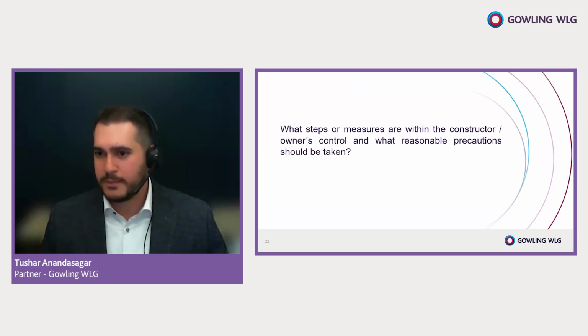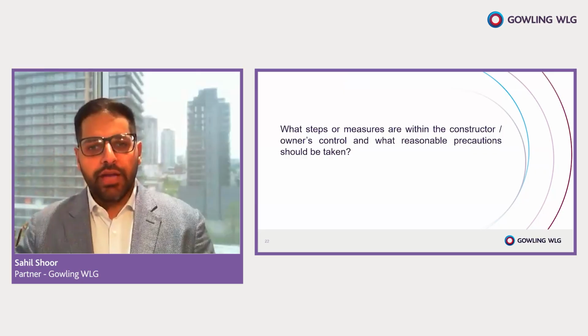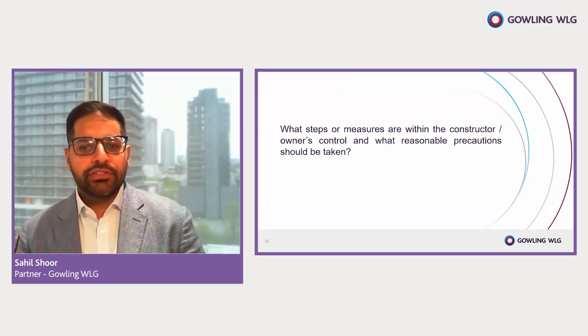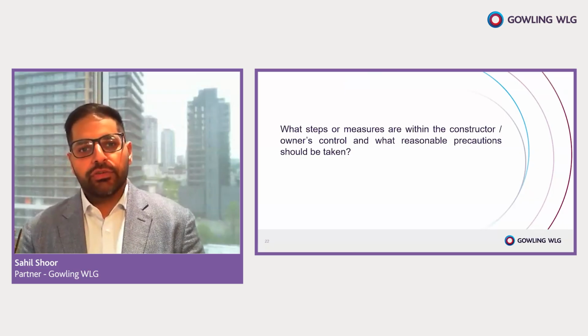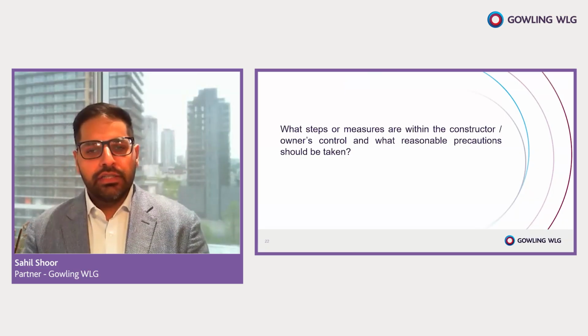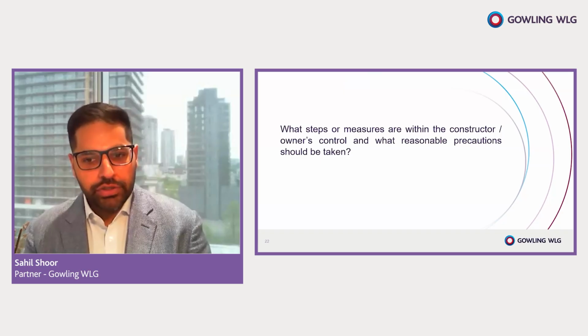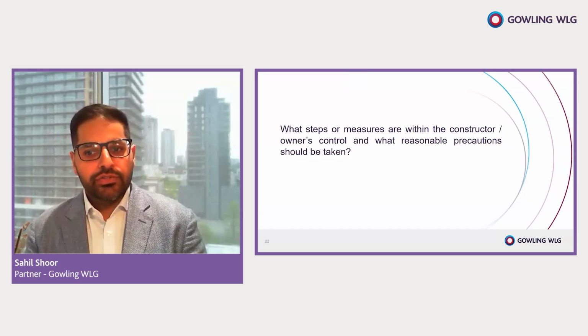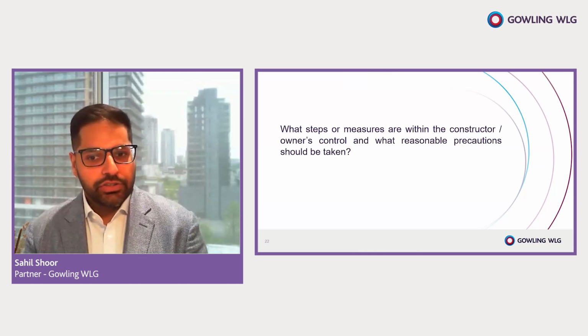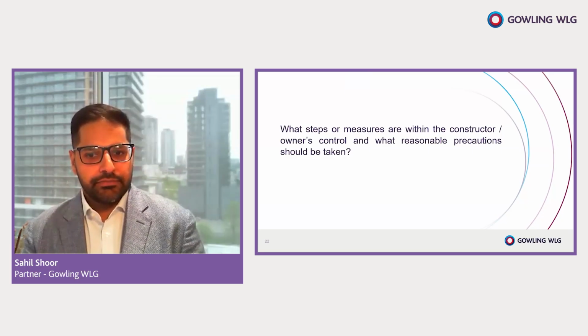Is that okay? Yeah, certainly. I'm going to take even a step further back before we even get to the contract. I'm going to start at the RFP process. When you're thinking of going to the market and taking the project to the market, and you are an owner in particular, one of the things that you want to build into your RFP process is a really robust review of not just the prior projects and the good construction work and the good management work of the potential contractor, but what is also their health and safety record?